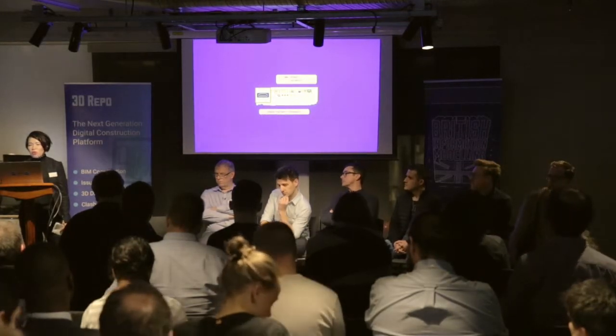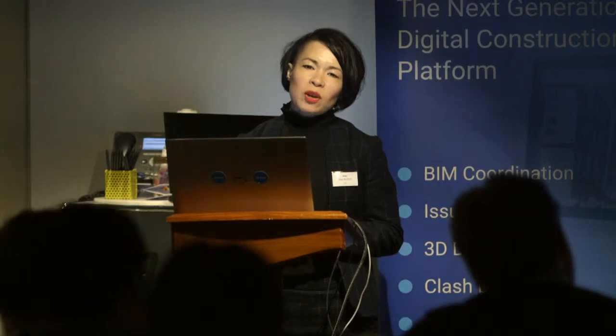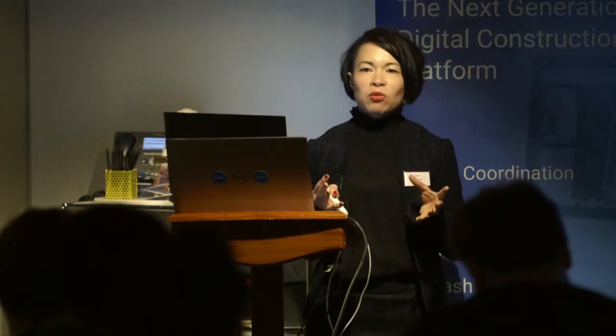So the first question is, BIM is pushing towards model-based information sharing to reduce the amount of file-based information sharing. How do we achieve that if we're using contracts which need files? It's a matter of differentiating between what your contract deliverables are and what your processes are. So, for example, looking at a model will never be a contract document.